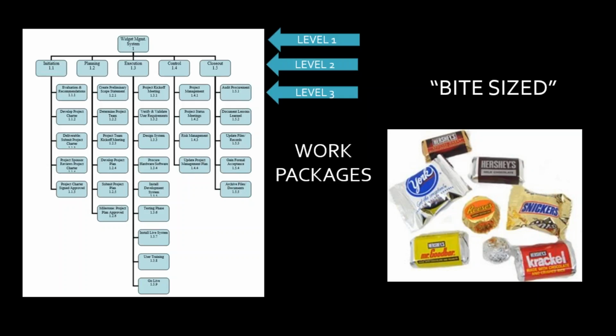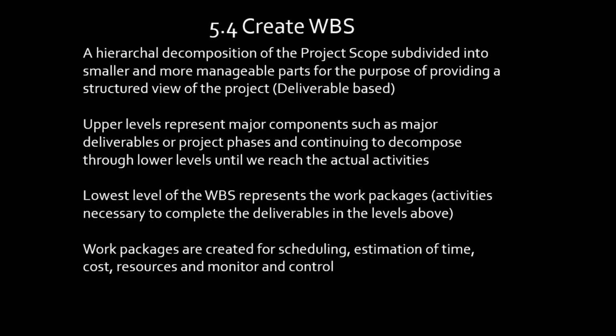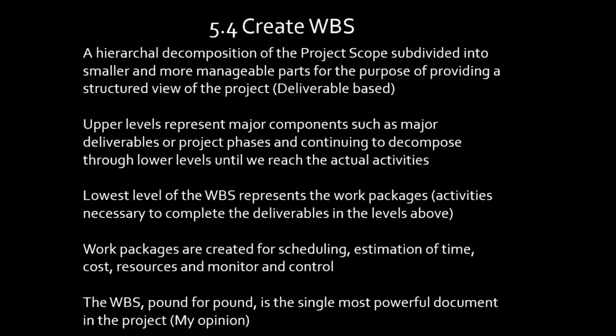The work breakdown structure is a deliverable-based document, okay? To create that work breakdown structure, I just talked about it, you break it down into smaller and smaller pieces, chunk by chunk by chunk, until we get down to work packages. You can't miss this way, all right? If you do this in a deliberate fashion, breaking down piece by piece, you're not going to miss a thing. You'll account for everything, and that's really what it's all about. Pound for pound, the single most powerful document in the project.